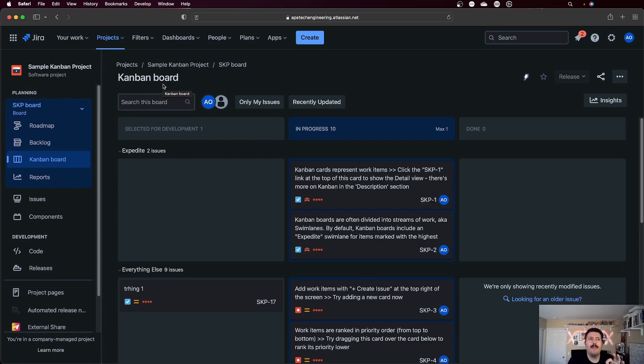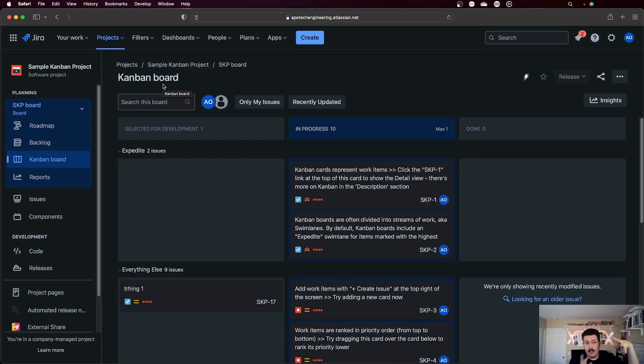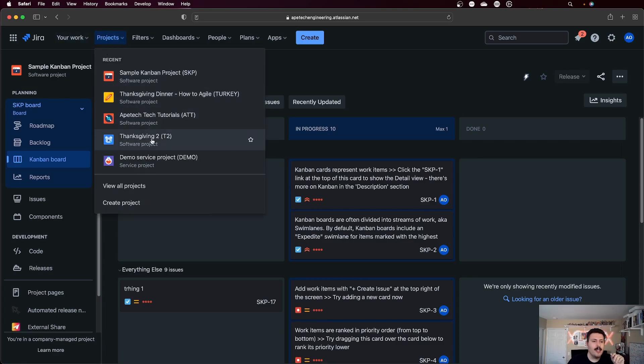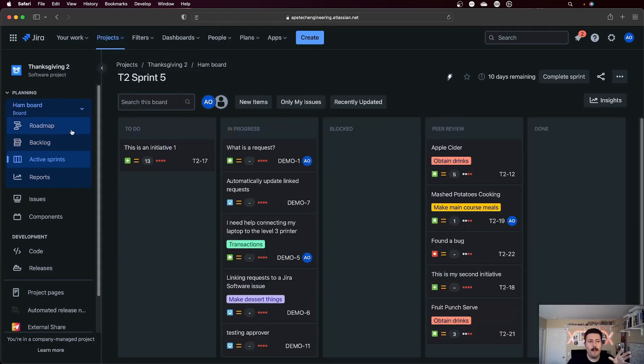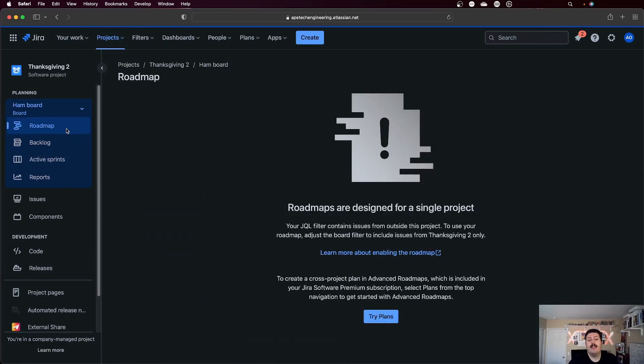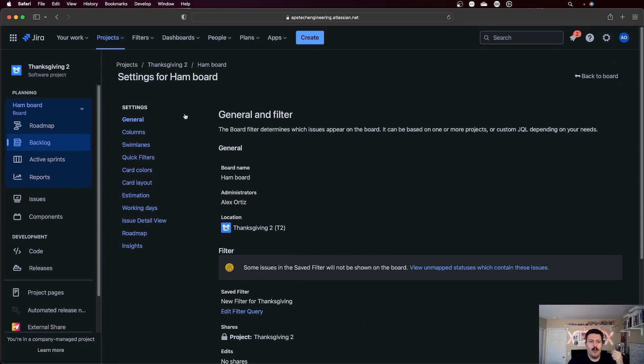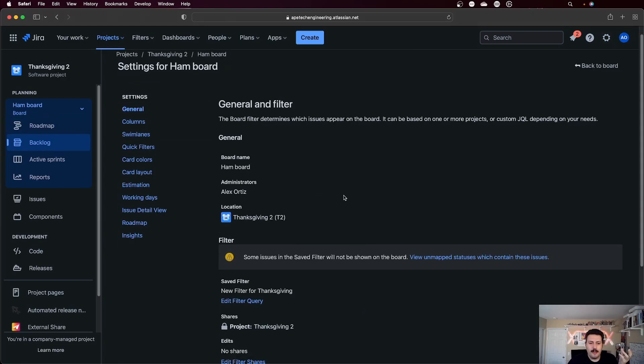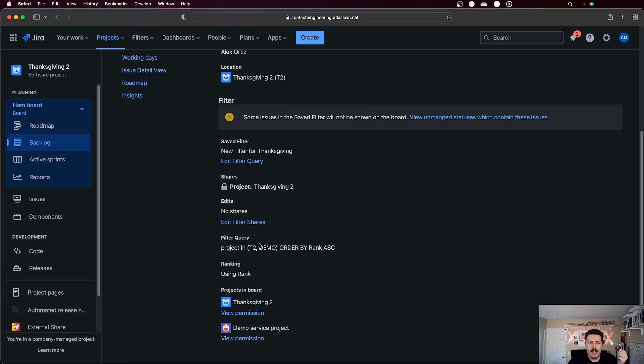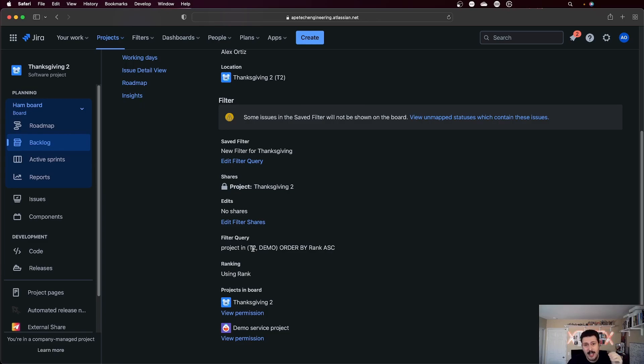But if you decide that you want to bring in issues from another project, if you want to bring them into this board or into just this project, then we're going to have a problem. Then you're going to get an error like this, where Jira is going to say no, the basic roadmap doesn't support this. Your JQL filter, and let me show you what the JQL filter looks like. Your JQL filter under general is going to look like this, where you have project in, and then you have two or more projects. If you have this scenario for your filter criteria, this will break your roadmap.